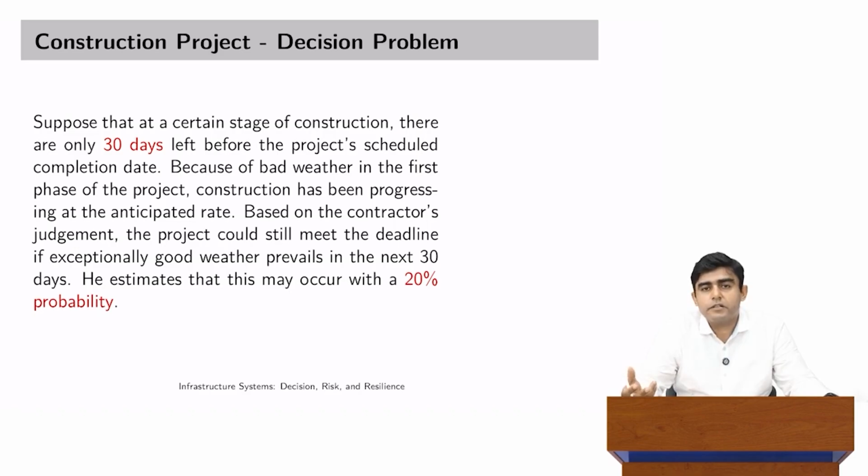How will an expedition happen in any project? More resources need to be mobilized, and resource mobilization involves cost, which would be cutting from the profit. Although it seems easy to say, yes, let's get more machines, more laborers or more engineers on the site, there are cost implications involved. Hence, it has to be an informed decision from the contractor's side, so that they are at the end making a net profit. Even if deadlines are missed, they may have to pay a penalty, but if the cost of the penalty is way higher than the cost of mobilization, then of course mobilization is beneficial.